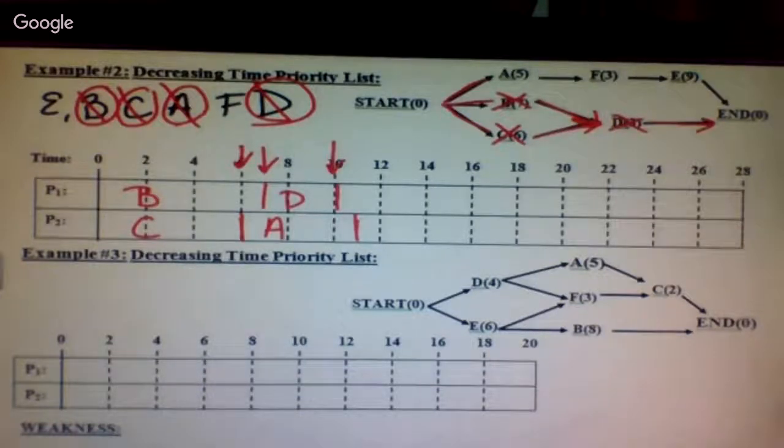Michael just said, oh, I can't do nothing. So if we can do nothing because nothing is ready, that means we idle until the next task is done. You look at your list and nothing is ready to go, we have to idle until the next task is over. So at 11, we finally finished with A, which means what is ready?